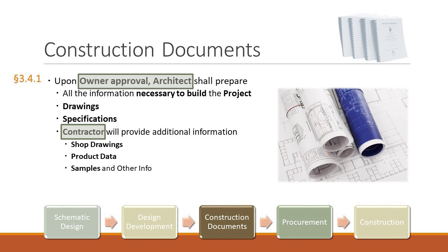Now you got to prepare the construction documents. Now we go to construction documents. Drawings and specifications here are capitalized. So that means that those are a defined term in the document. In fact, they are a defined term for all the documents. When the contractor enters into its owner-contractor agreement, they're also going to have capital D, capital S. And it's defined as specifically those documents from which the contractor can build the project.